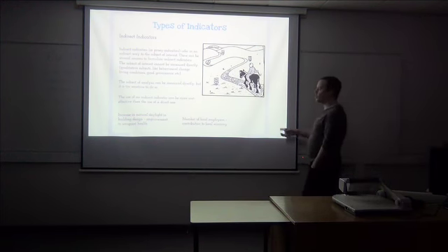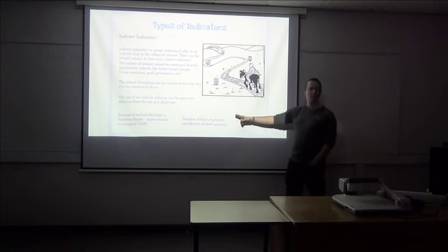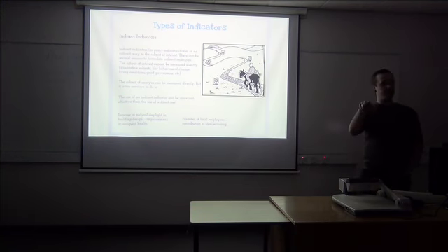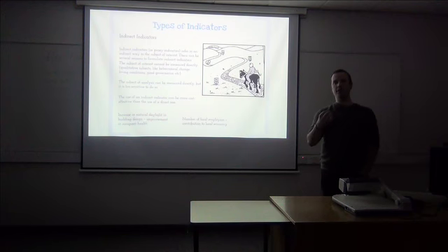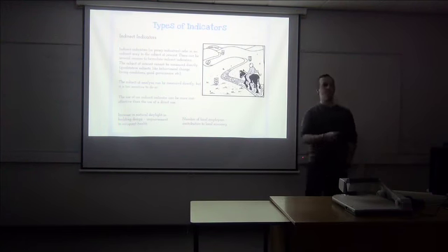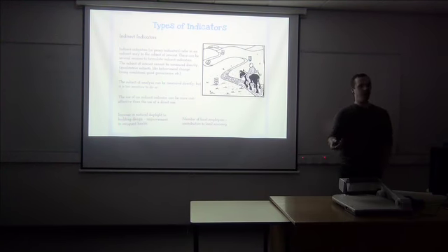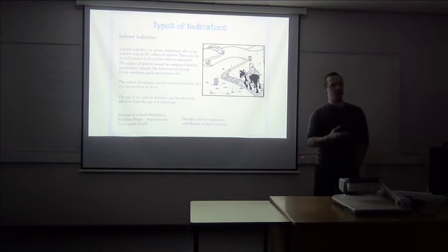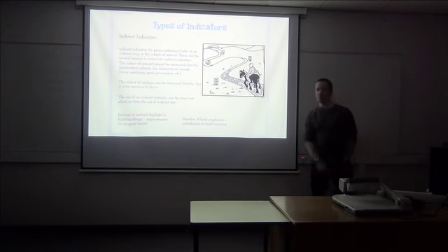Again, how do we measure our performance in the local economy? If one of our social sustainability, economic sustainability outcomes is to provide more employment to contribute to the local economy, it's difficult to do that, but a proxy indicator can be the number of local employees. So if you say on our project we've employed 50% of our team are local employees, therefore you can argue that it creates a contribution to local economy.